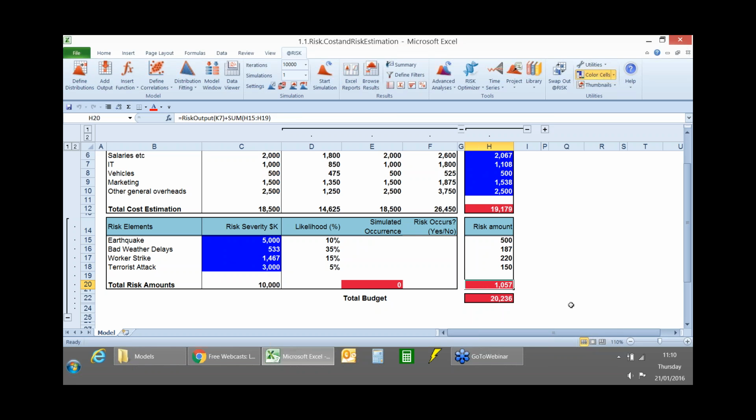Well, I kind of gave a clue to it back then, and that's the idea that what we're going to do without risk is to build in a conditional relationship so that if a risk occurs, it gets counted in full. If it doesn't occur, it doesn't get counted at all. So this is the idea here that either it's going to be 5 million or it's going to be 0. And how we do this is through the use of discrete distributions.